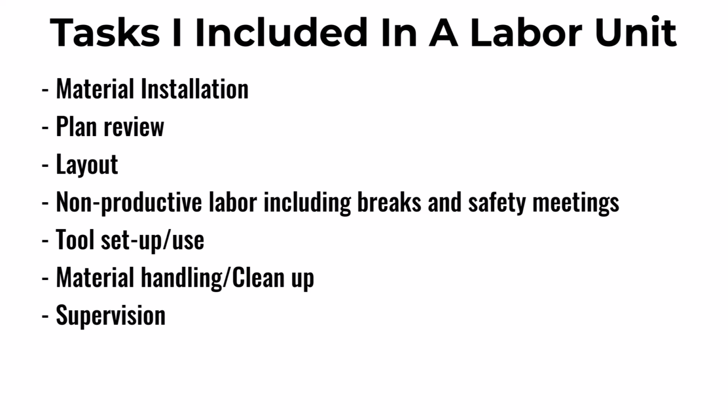In reality, only 2 or 3 individuals will be involved in all the components of a labor unit. Those individuals will be the worker, a supervisor, and possibly a material handler. On a small project, I would expect the worker to gather and organize their own material and would not account for material handling separately within the schedule. Normally, this would be accomplished by stocking a connex and yard with the estimated projected materials and having individual workers gather and transport it from there.